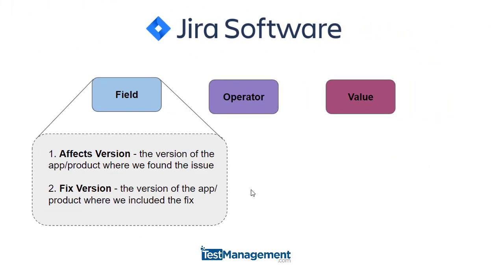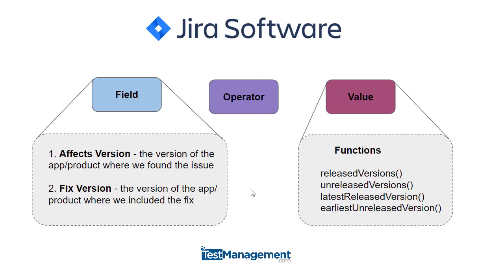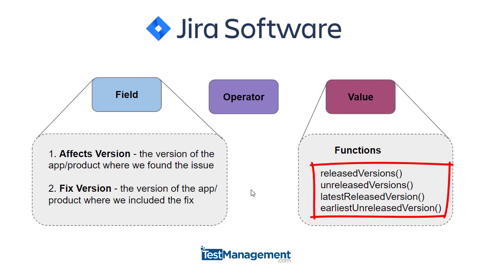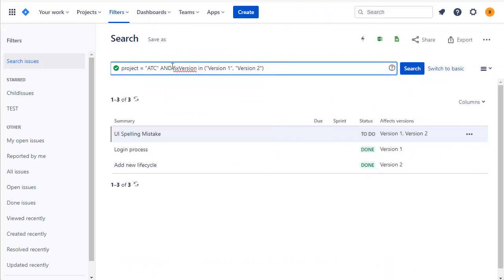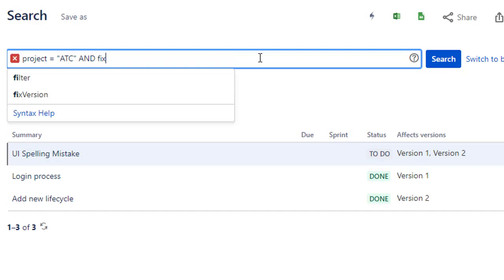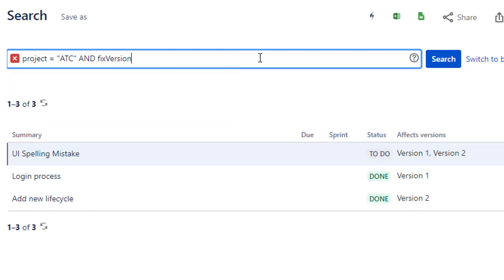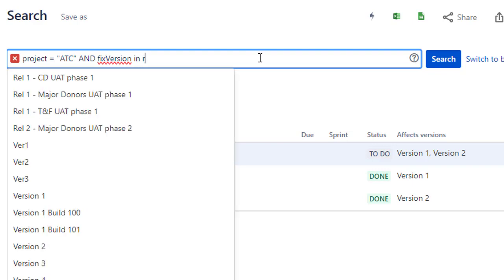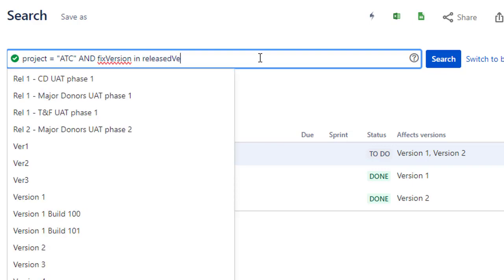Now for the more advanced JQL searches based on versions. Jira gives us functions: releasedVersions, unreleasedVersions, latestReleasedVersion, and earliestUnreleasedVersion. So if we want to find all issues fixed in a version we've released, we can do fixed version in releasedVersions.